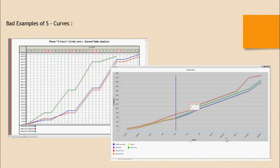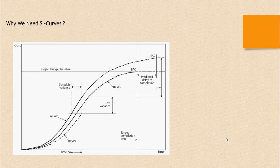Now I will show you a basic example of an S-Curve. The definition itself says the curve should be S-shaped. If an S-Curve does not represent an S-shape, it means the project has not been properly planned and resources will not be properly allocated over the duration of the project.